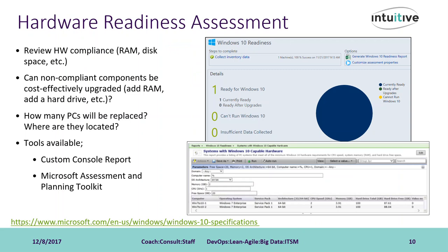Once the hardware assessment is complete, you can determine the quantity of computers that meet the requirements for Windows 10 as is, how many will require cost-effective hardware upgrades, such as RAM or hard disk replacement, etc., and how many will need to be replaced outright as part of the migration activities.